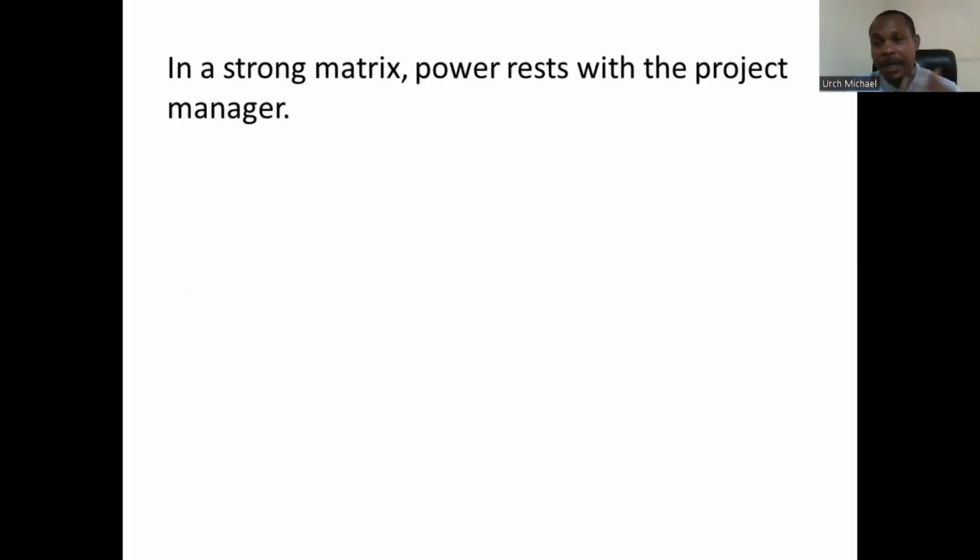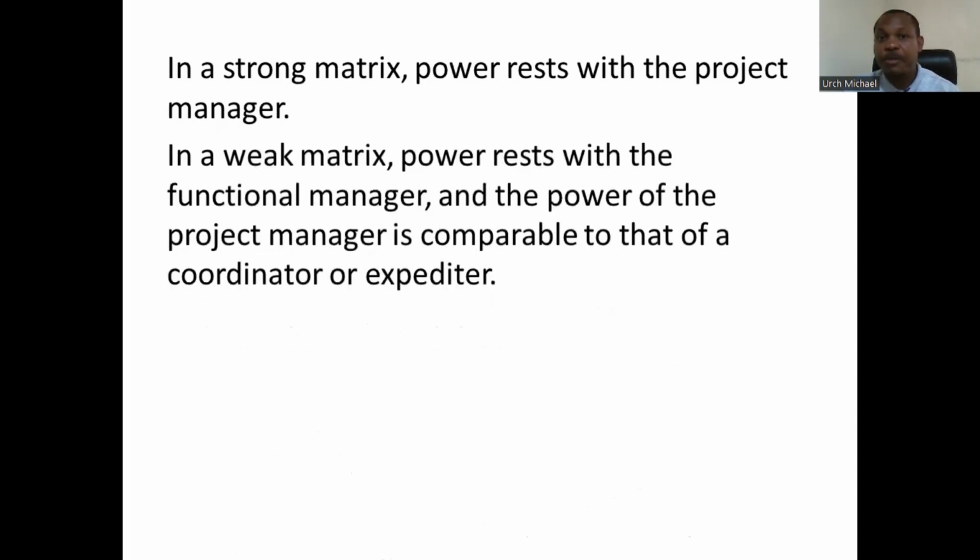Now, as I talked about, in a strong matrix, power rests with the project manager. In a weak matrix, power rests with the functional manager, and the power of the project manager is comparable to that of a coordinator or an expeditor. So as a project manager working in a weak matrix organization, you cannot call yourself a project manager. Sorry to say that, but that's just how it is. You can't say you're a full-blown project manager in that organization, but you can be seen as a project coordinator.